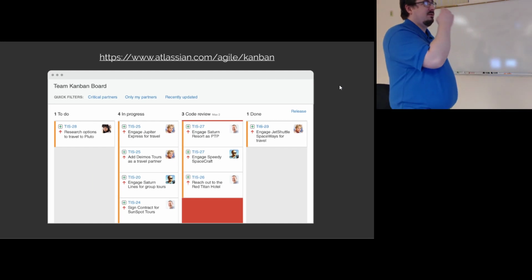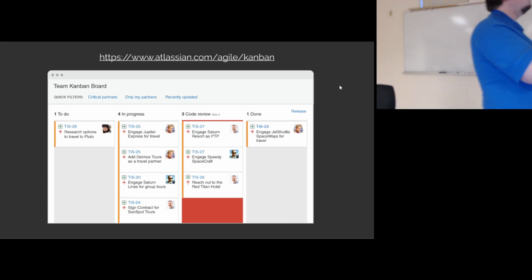So you kind of see something like this. Usually Kanban boards end up a little bit like so. You can see we've got columns, and you can see we've got cards that go into there. The general recommendation I would say for you to start, like he was saying, is for sure you need a to-do or planning column, and then an in progress and a done column.